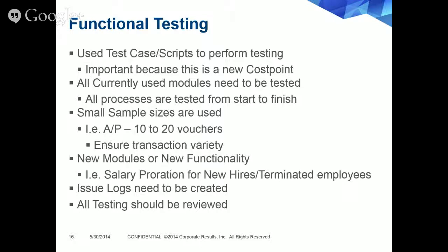Within functional testing, we recommend using issues logs. That'll be a good place to store your errors or your questions from the functional testing, so that one user can go in and say, I ran into this error on this screen. Maybe they weren't set up correctly, or the system admin can go in and see that error log and possibly change the preferences. It's a quick error. Or if someone else tries the same thing, maybe they get that error and it's a ticket to Deltek, or it's a different type of issue that would need to be fixed. So an issue log is a good place to store your overall errors and make sure everyone's on the same page.